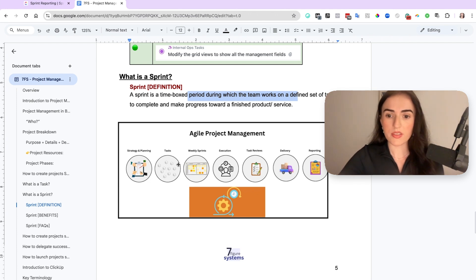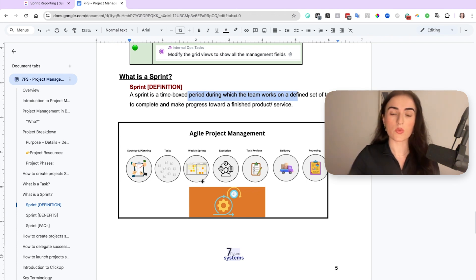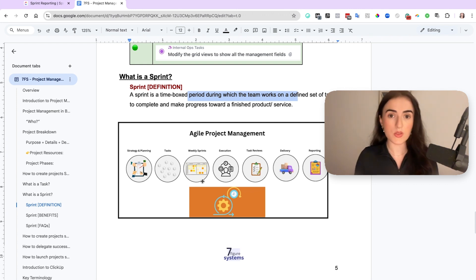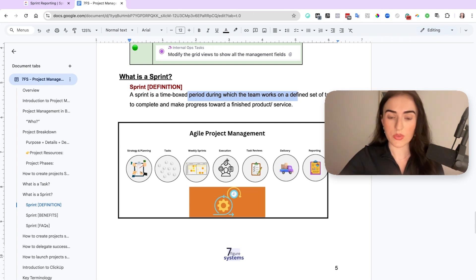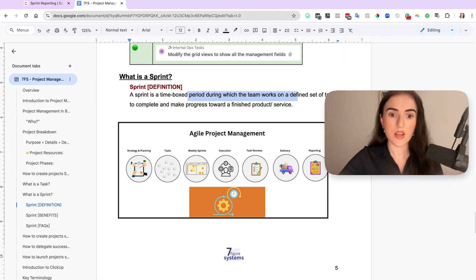So you have a list of tasks and what you're going to do is put them into sprints. For example this week we're going to focus on these 10 tasks and next week we're going to focus on 10 other tasks. And then you get your team to execute, you review the output to make sure the quality is there, and then you deliver to your clients.